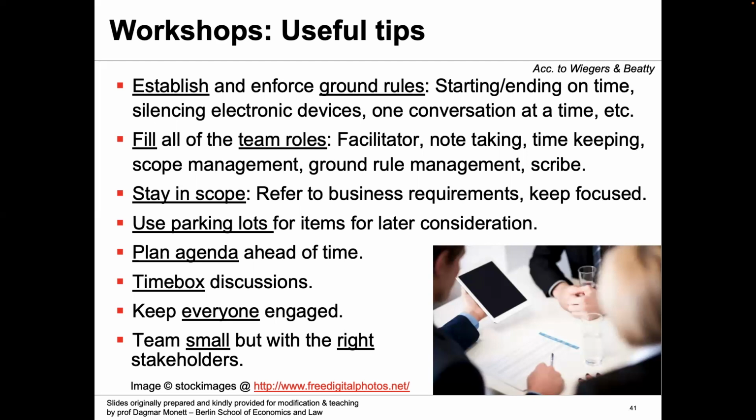So if a participant comes up with a topic that is really not directly associated with your mobile tracking app, just in order to show them respect that they have chipped in their idea, you can use another category called the parking lot and put their idea over there. Time boxing again is really important. We have to avoid the trap of spending too much time on one item on the agenda and then ignoring the rest. So we really need to time box all the agenda items so that everything gets discussed. And yeah, keeping everyone engaged.